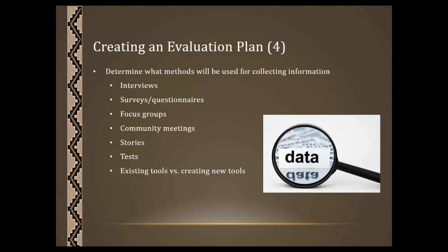For language projects, you definitely want to do a pre-test and a post-test. Again, depending on your project, it'll determine what type of testing is warranted. But for language projects, you want to be able to determine where your participants were when they started the project and where they were at the conclusion of the project.